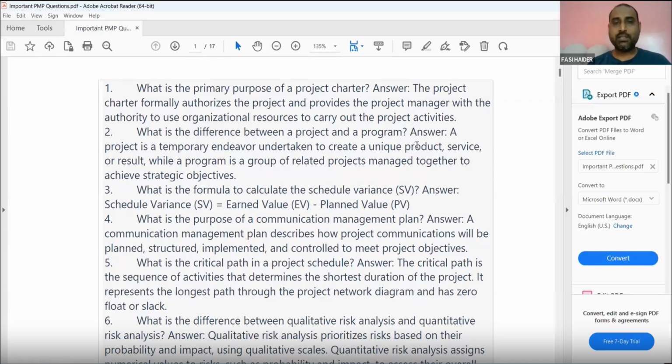We gave the example. Suppose somebody is in the civil engineering field and he is building, let us say, schools. If he is building a school, he is a project manager for building that particular school. Suppose he is managing the building of four or five different schools at a time, in a city or in a country, simultaneously. So he will be called a program manager. Now suppose he is also building hospitals, movie theaters, different businesses of the company. So he will be called a portfolio manager.